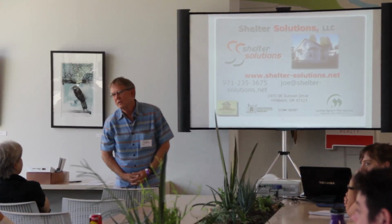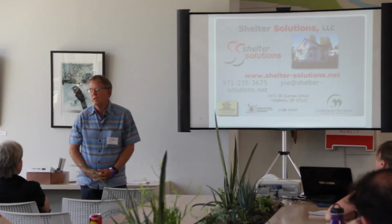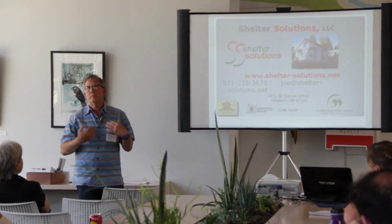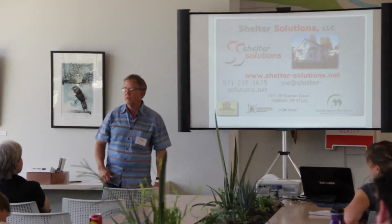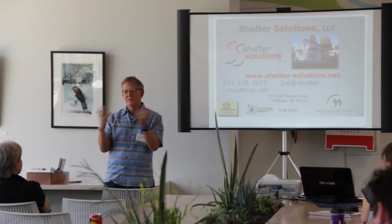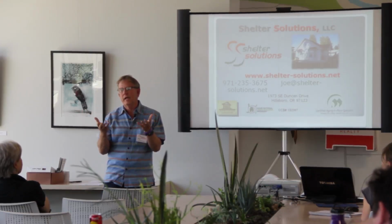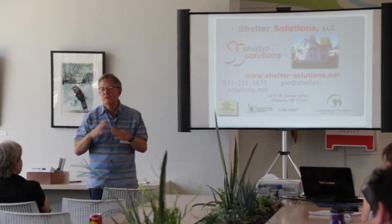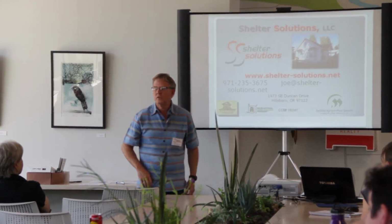Can the client be involved in the process to help bring the cost down? Yes. Yes, but qualification we worked that out during a feasibility study. I don't personally like it when somebody says, well, my uncle's an electrician, I want to get him. My son-in-law's best friend is a plumber. I kind of lose control of the project. And I'm responsible for the whole thing and permits and inspection. But if the customer says, we want to supply the flooring, we've got an in on that, this is what we want to do, we want to do painting ourselves, things along those lines, I'm flexible to work with. They're usually not code related. Electrical, plumbing.